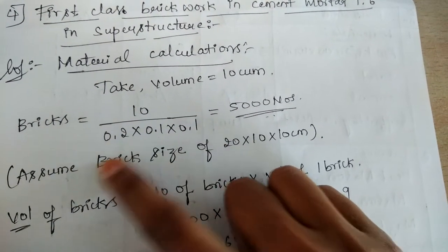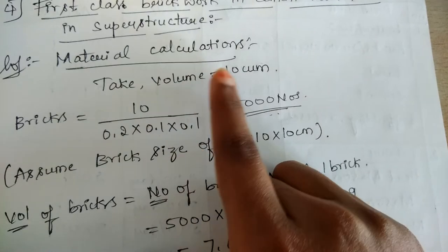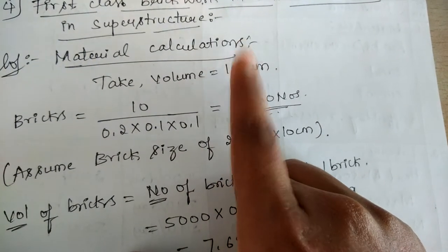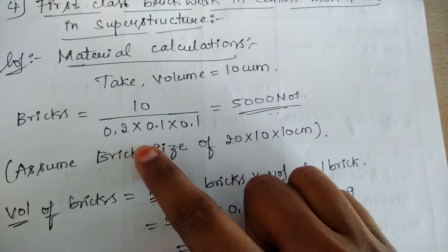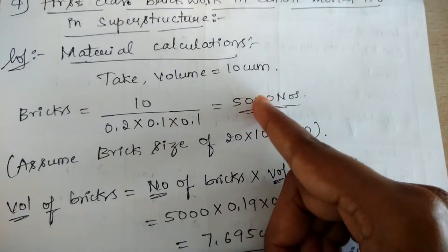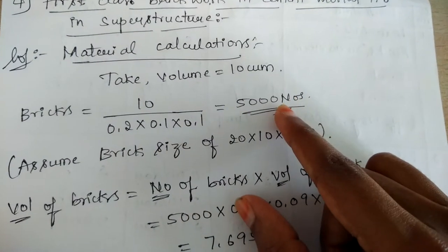This gives you the volume of one brick. On dividing the assumed volume by the volume of one brick, we will get the number of bricks, which is equal to 5000 numbers.